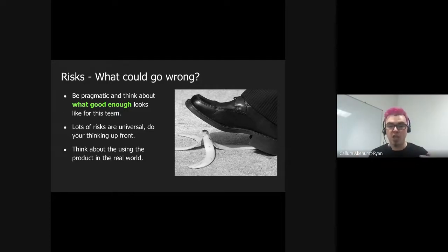Because you know this, think about the risks early. And you can create heuristics. You can create a cheat sheet of possible risks or a mind map of things. If you're thinking of data, you could think, what's too big? What's too small? What happens if it falls over partway through? Does it fall over to another data source? And you can share those with yourself and the other testers and get a huge list of cool risks up front that you can come prepared to the meeting with and look really awesome when you come and say, oh, I've had a think. Here are all the things that could go wrong. Do we need to consider any of these for our story?